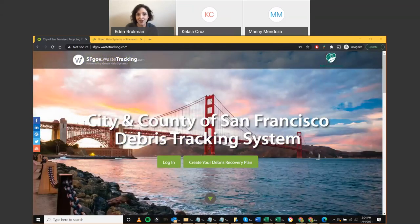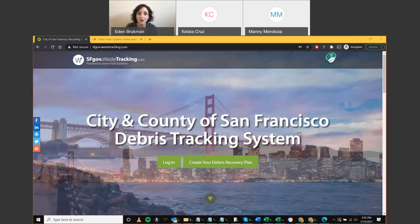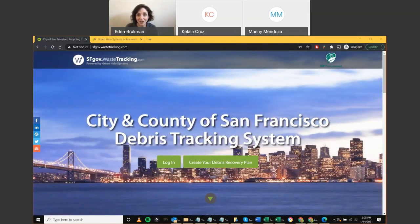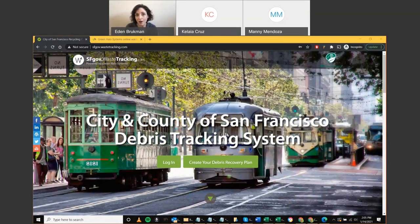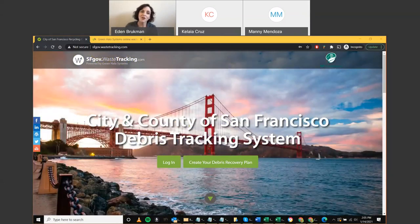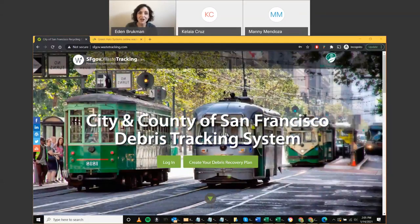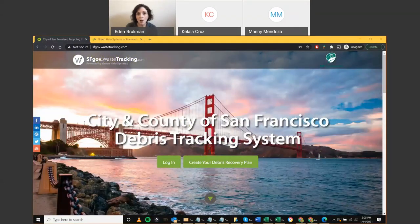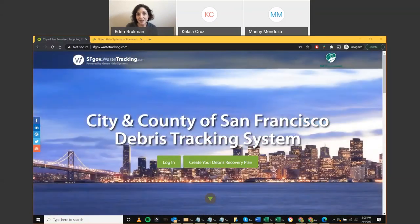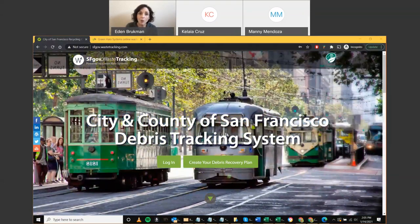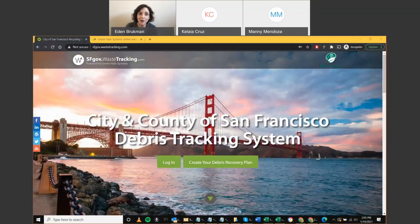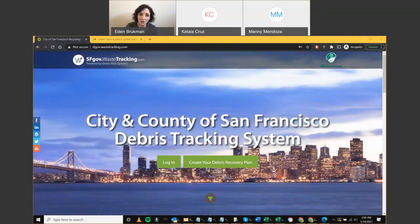For municipal projects, all projects starting construction on or after January 1st of this year should use Green Halo Systems. Projects that have already started using paper forms may finish on paper, but if you're still in early days, you may want to consider migrating to the online platform. Green Halo Systems has been working with the Department of the Environment to customize the platform for San Francisco municipal projects. Manny will cover a lot of ground today, though we won't cover all functionality. A user guide with step-by-step instructions and the session recording will also be made available.